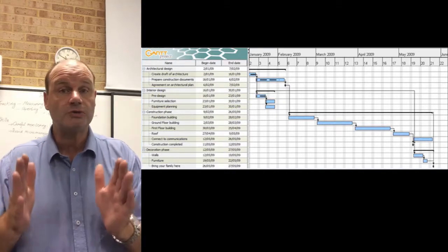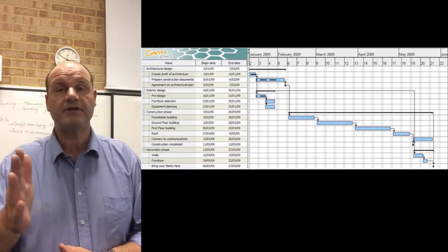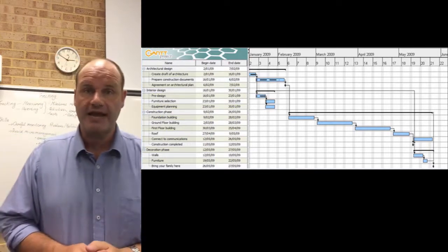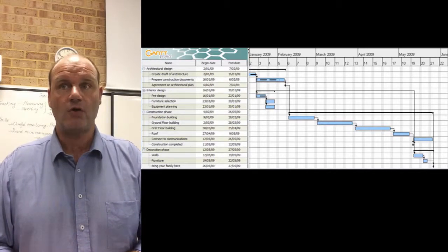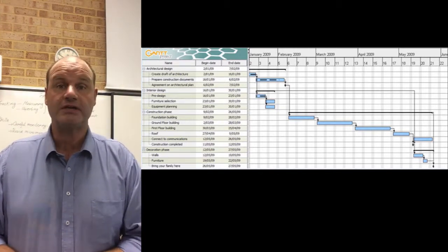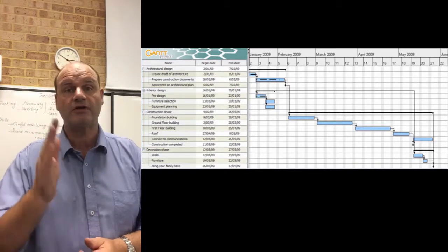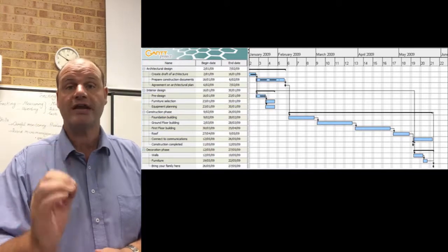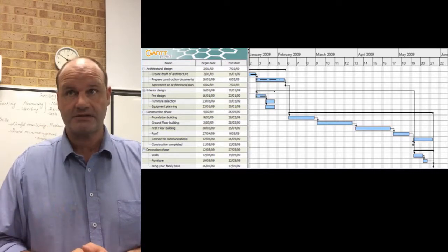After the name section you'll see the start and the end date, and you'll definitely see after that, the length of the job. Now the length of the job is in number of days, and those are shown by a blue bar next to each of the tasks. Some of those tasks have a dotted line in it. The dotted line is the tracking. It's the monitoring of how that job is going. Is that particular job on schedule? Is it on task? Is it going at the right pace?